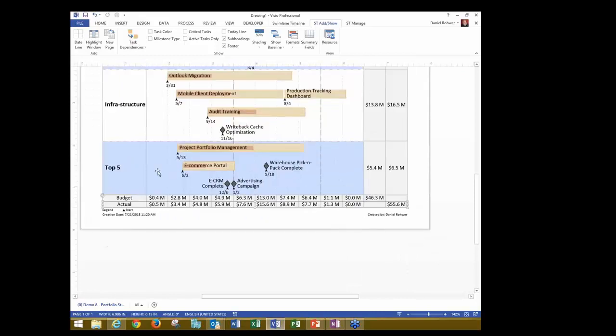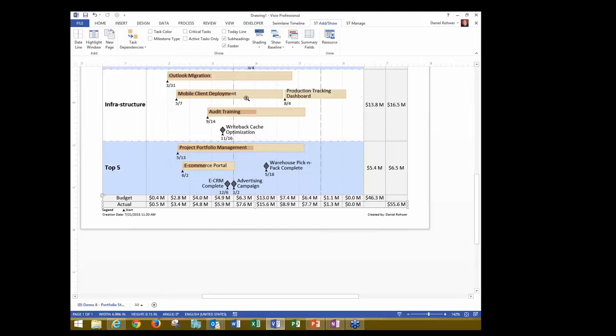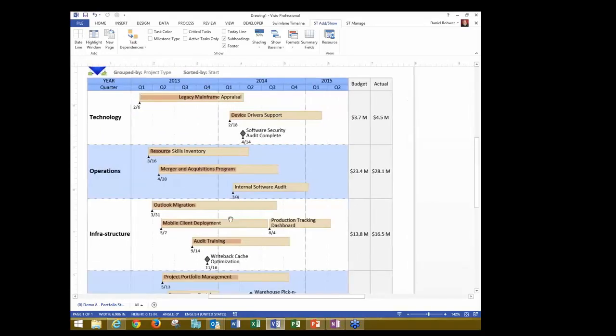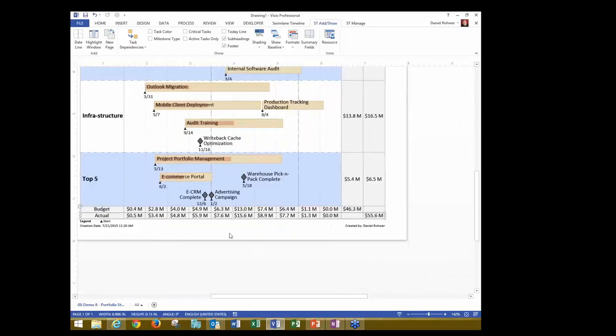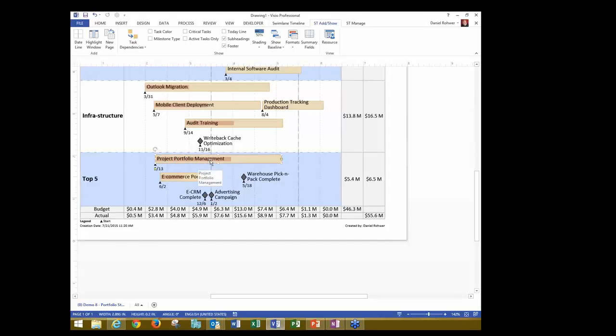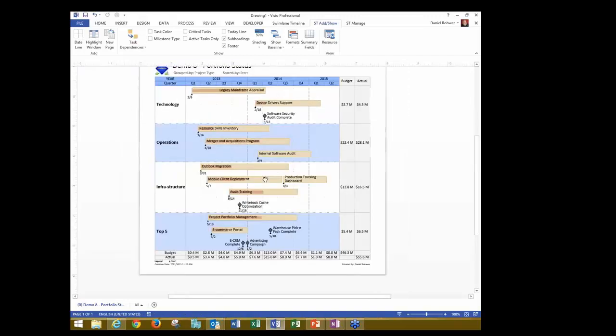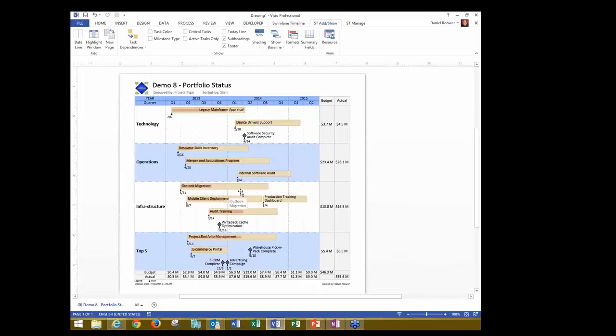And now if I look down here, I can see my top five projects. I've got the 5.4 million that were budgeted, but we've already spent 6.5 million. And then we also show, based on the time intervals, you can see, and this is not weighted. I just want to be clear about that. This is just taking, if this project here in particular is 5 million, it would see what proportion of that 5 million in this task is in this month, what portion is in that month. So it just kind of gives you a general idea. At some point we may add weighting to this. But, and those of you that are using the product, keep your wish list items coming. We do appreciate your feedback.